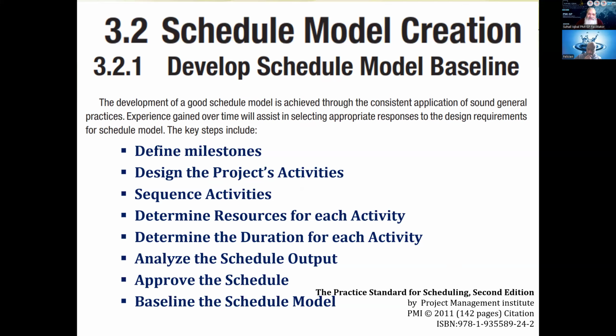You see, milestone is not an activity. Milestone is just a point in time at which certain achievement or certain something has occurred. For example, if a phase has finished, that is an achievement. So the proof of finishing the phase could be a milestone. You could put a milestone there.